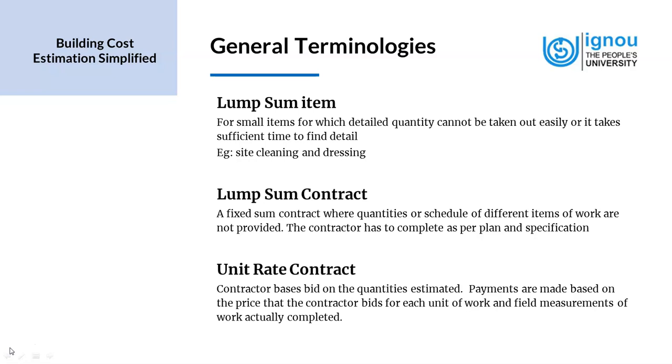One important aspect to keep in mind in lump sum contract is that either the detailed drawing or the detailed BOQ, the bill of quantities, is to be given to the contractor. This is very crucial. And whatever is deviation from this is counted as variance, as we mentioned.